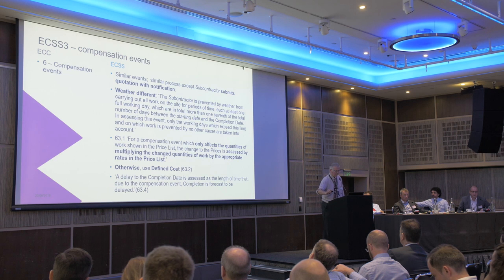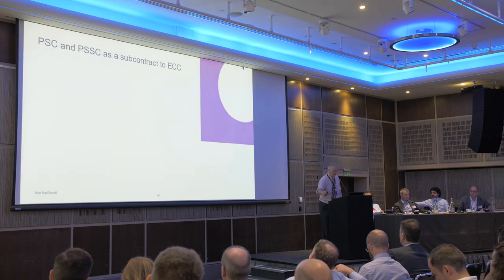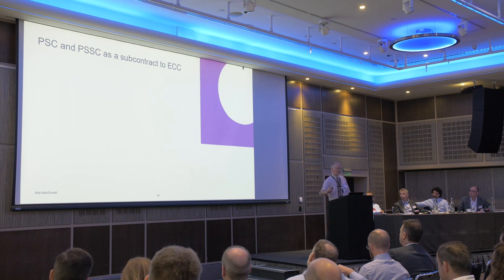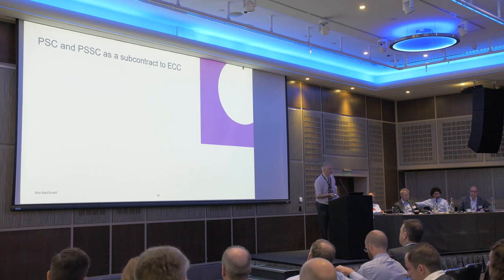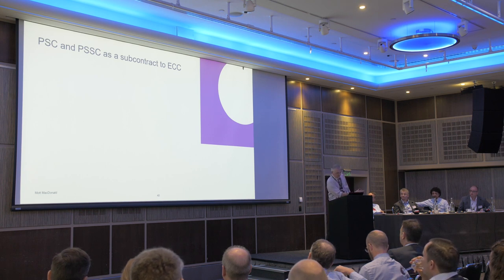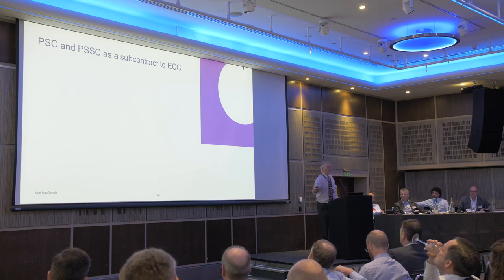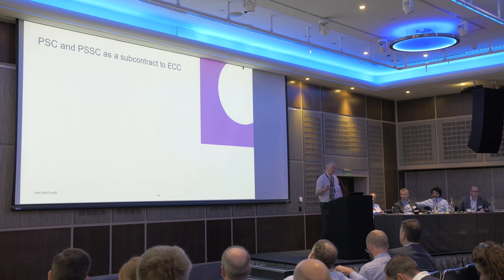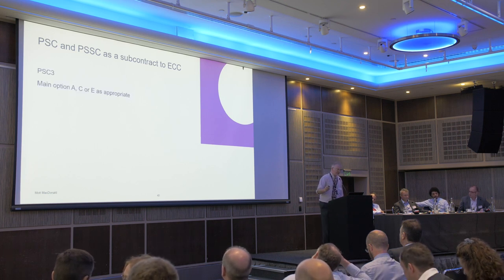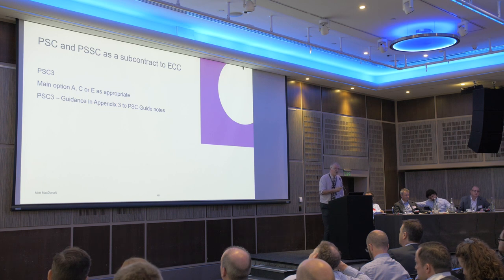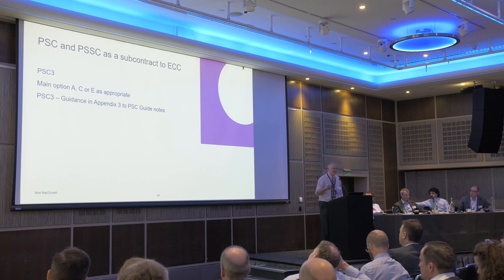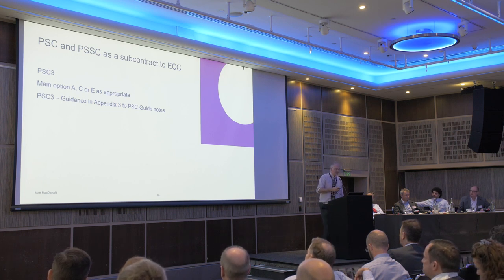Have you had any arguments about whether a compensation event only affects the quantities? Because if it doesn't only affect quantities, then we open the door to defined cost for everything. PSC — same options. The contractor might employ a consultant like a fine consultant through the PSC or through the Professional Services Short Contract. PSC has full options and there's guidance in the guidance notes on how to do that.